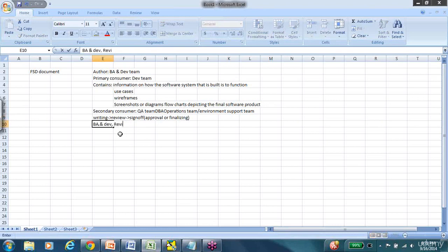The review, in the sense, see, there are two forms of review. One is review on an FYI basis, or for your information basis. This is the case with the QA team. They are only sharing the business, the functional specification document on a for your information basis. They are not asking for the QA team's approval. On the other hand, there is another form of review that requires the approval. Usually for the FSD document, the approvers can be the project manager, the client,